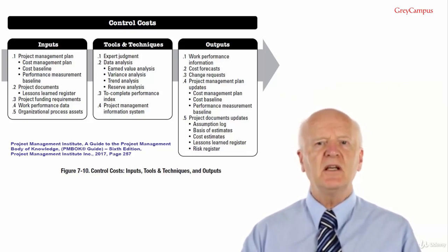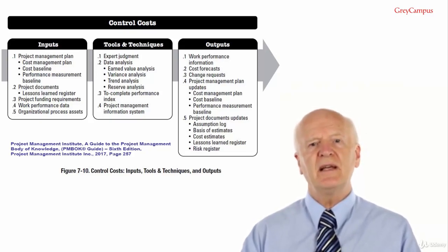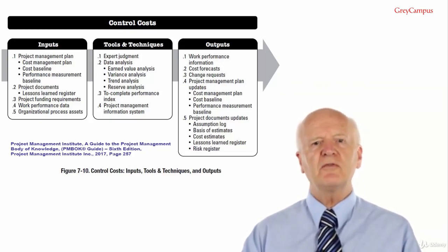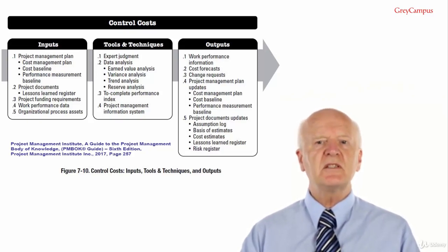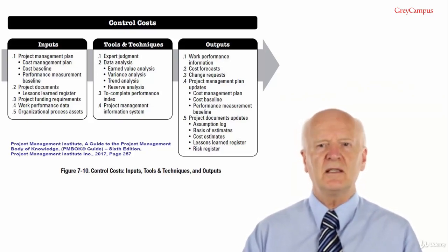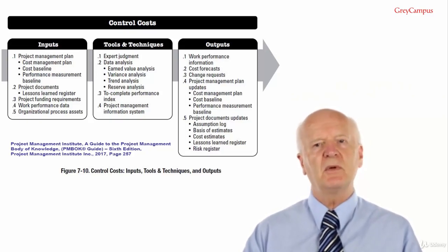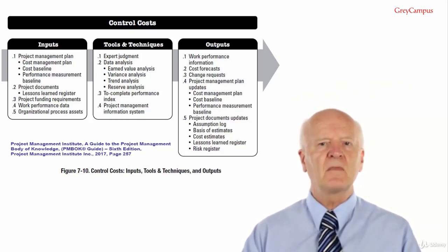Early in the project, you will still largely be in learning mode. The percentage range of acceptable variances are often quite large until the project settles down. However, much later in the project, the percentage range of acceptable variances can be reduced significantly because the project is more predictable and defined, plus of course you've already produced some of the outputs.